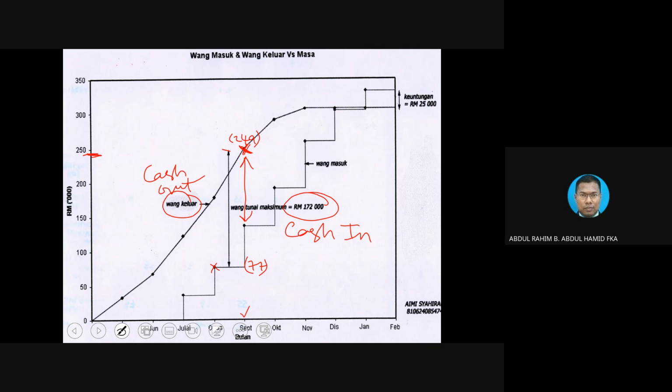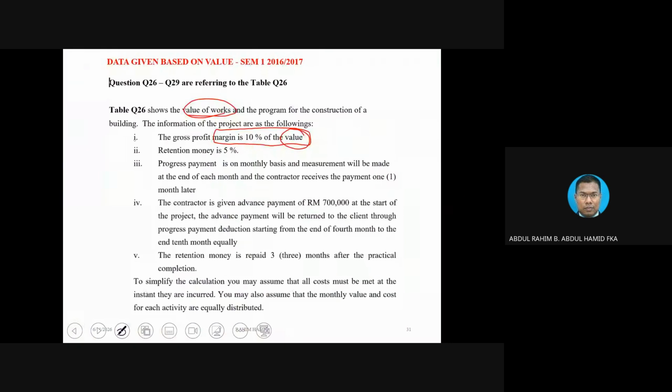Okay. And you notice one more thing, the end of the graph. The end of the graph, see, this point indicates value. This point indicates C, and the difference between these points is exactly the profit. So that is how you do the accounting. In proper accounting, bookkeeping, everything must basically close. The account will be closed. So if you do it properly, then you get the idea. All right. So that is a typical example.